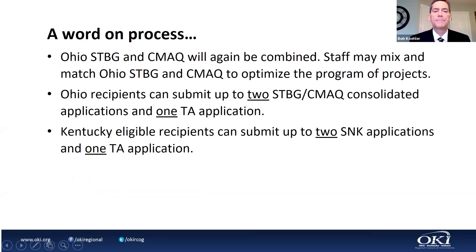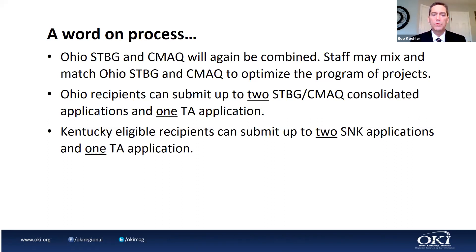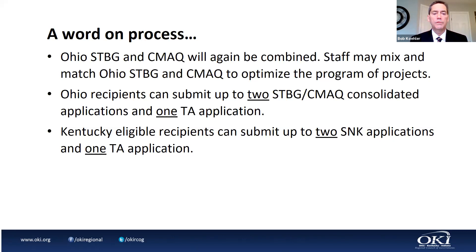We have CMAC calls every other year, and this is the year for that to occur, so we'll be combining the STBG and the CMAC. Federal dollars have some different stipulations, but we'll find elements that best fit your project — if we can use CMAC, we will; if not, we'll accomplish that another way. Each applicant can submit up to two STBG/CMAC applications and one TA application.